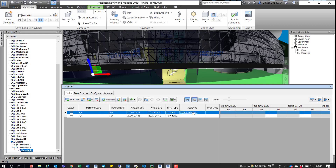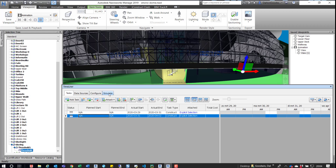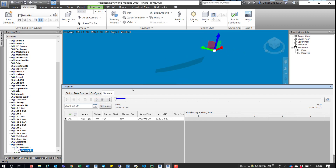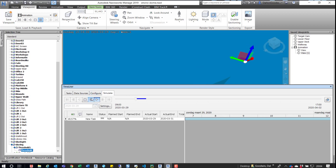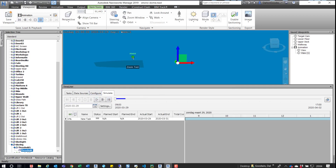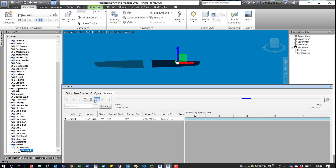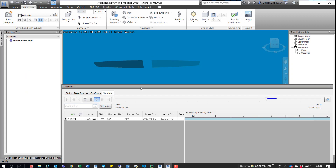Now we'll grab the other panel. You can switch the task and then grab the panel, or as long as it's still selected, switch to the task you want to assign it to. Just verify that you're selecting the right element, and with that selected, attach the current selection. In both instances these have been attached. Now we can jump over to the Simulate tab. Since it looks like the animation is still set, I'll come in here and say No Link, press OK, then press Play to see the simulation in action. You can see the percentage of completion down here — it completed the first panel and now it's on the other one. You can see the transparency with it.